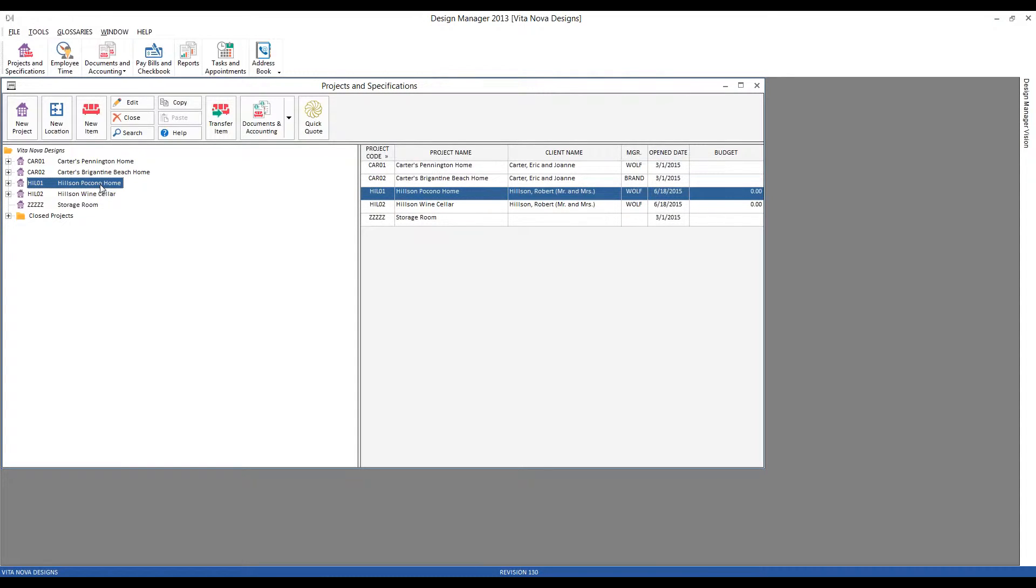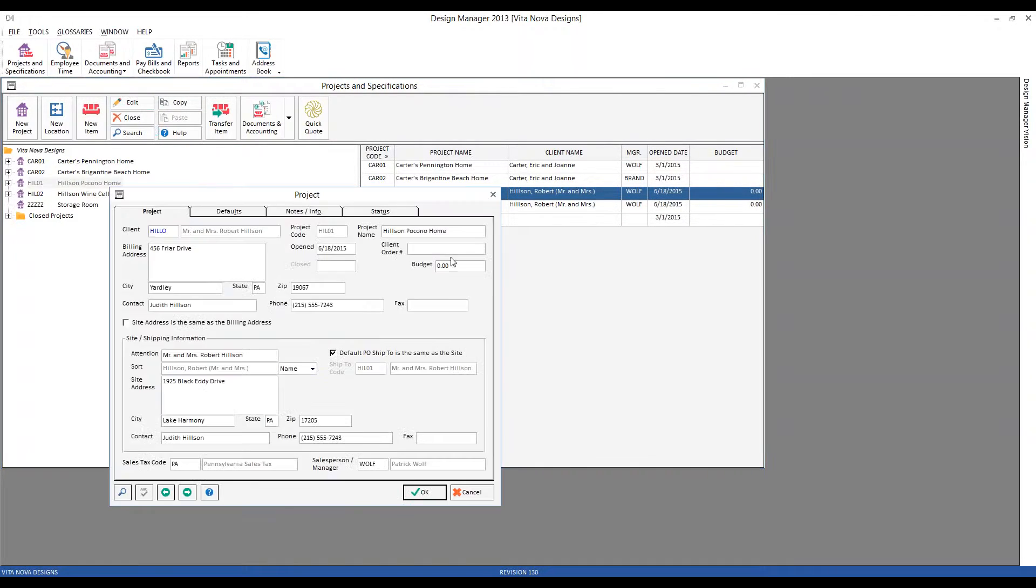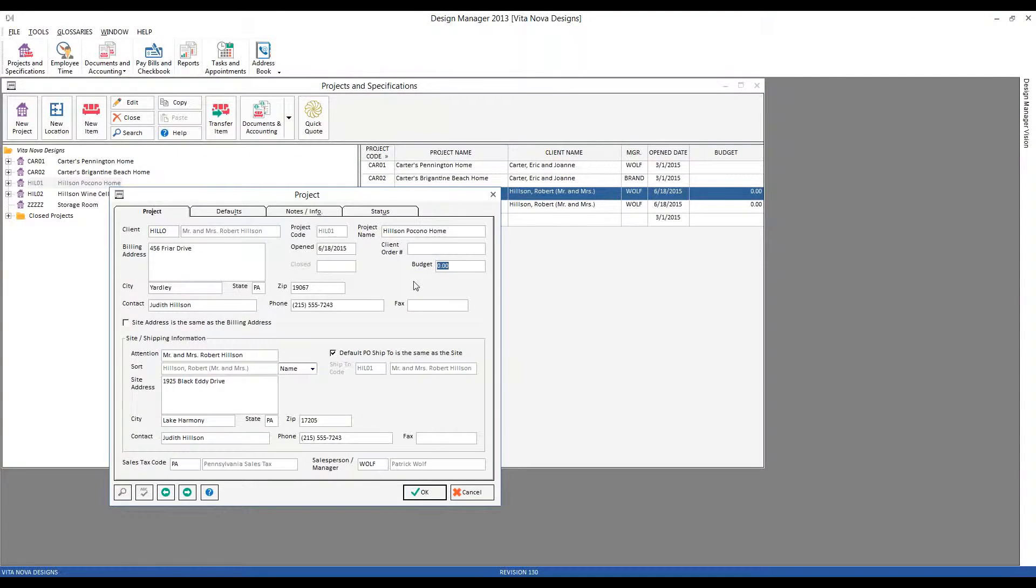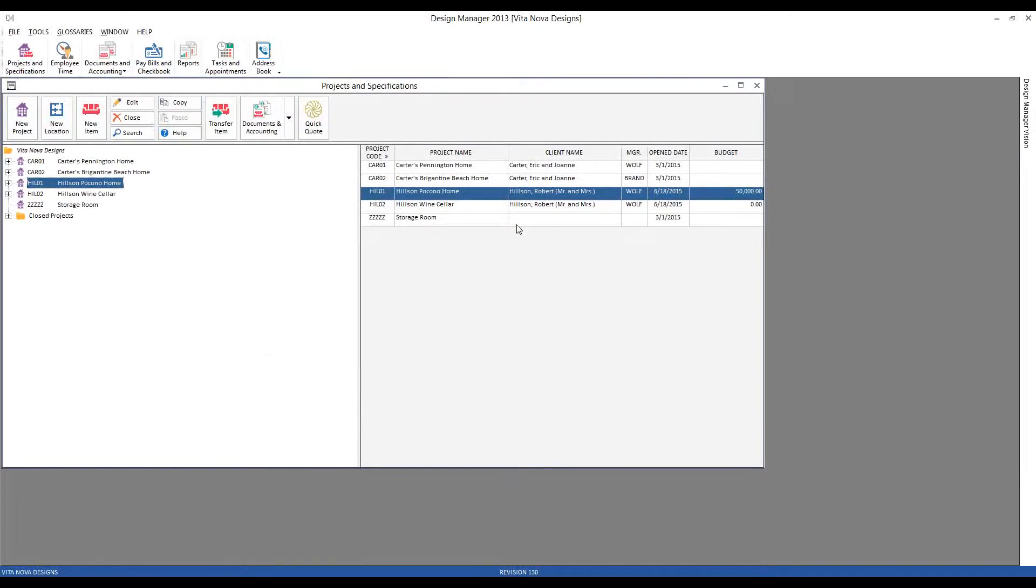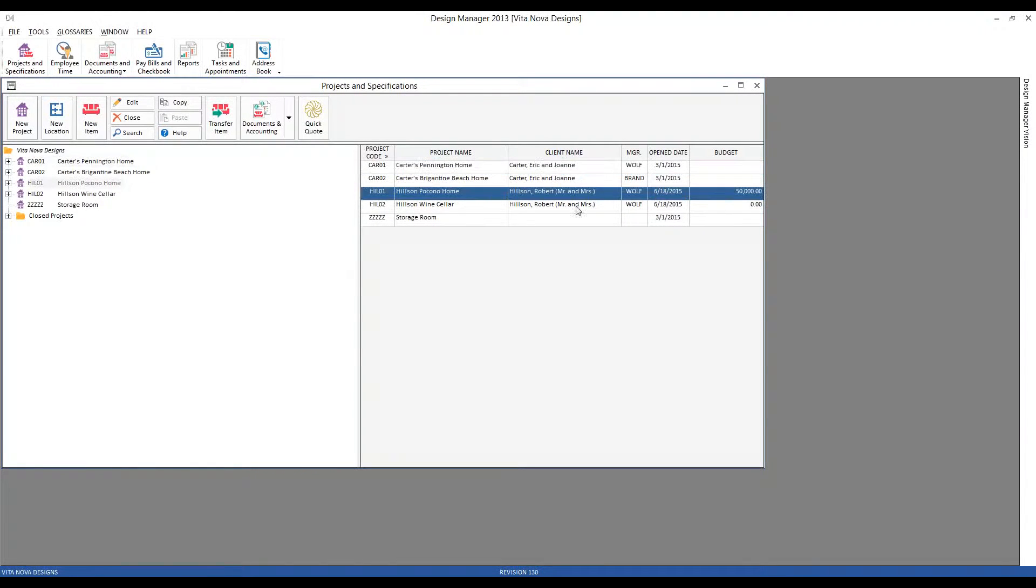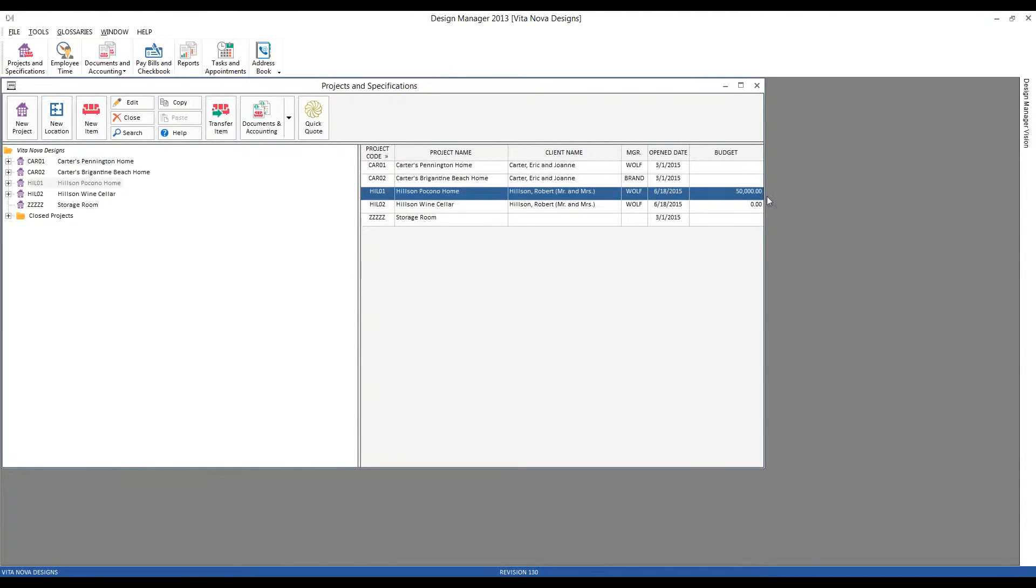Creating a budget for the project first begins with the project itself. A budget can be entered on the project window, project tab, as we can see right here. So let's imagine that our budget for the Pocono home is $50,000. We save our project. We can also see it on our projects grid on the budget column to the far right.